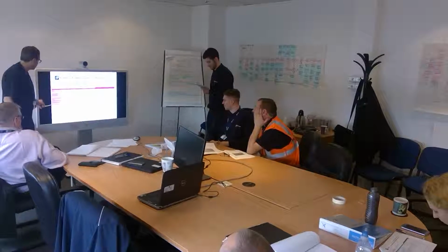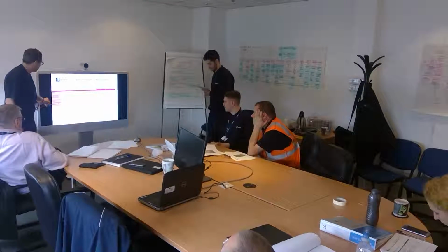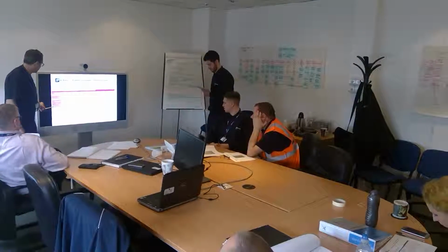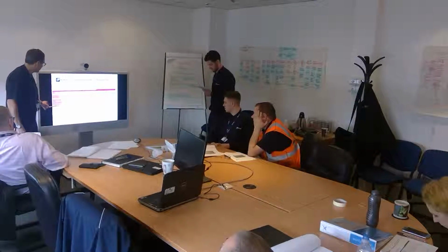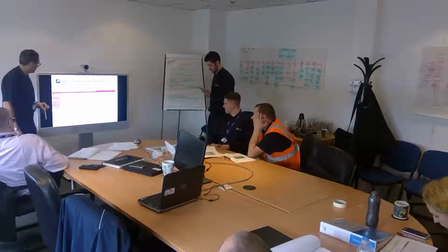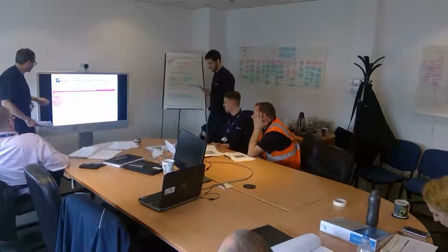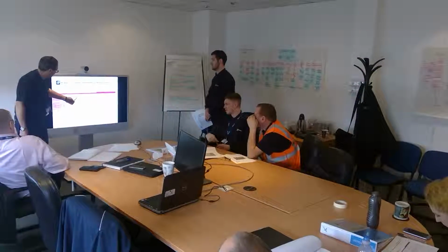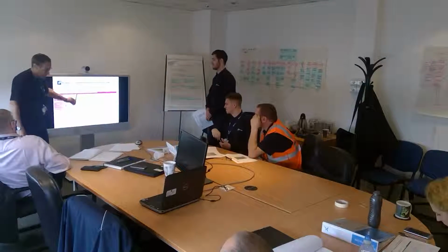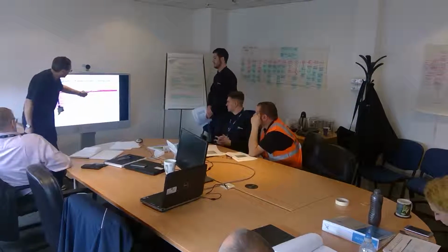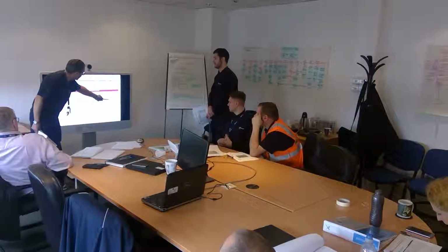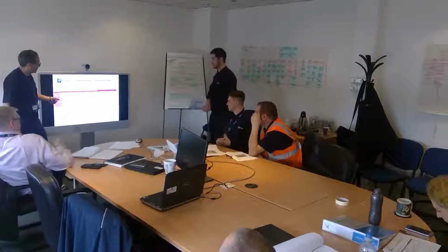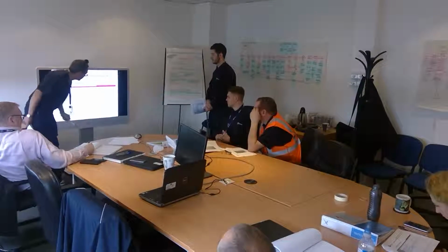Inspection, we need to inspect the spool. Dispatch, we need to prepare for dispatch. And post-production admin needs to check the drawings against the inspection reports, scan them, mark them off on the spreadsheet, etc., and file all the copies. So the actual time for all of these individual elements is relatively small, but when you actually work it out, that one error due to lack of information on that job cost us 500 quid.